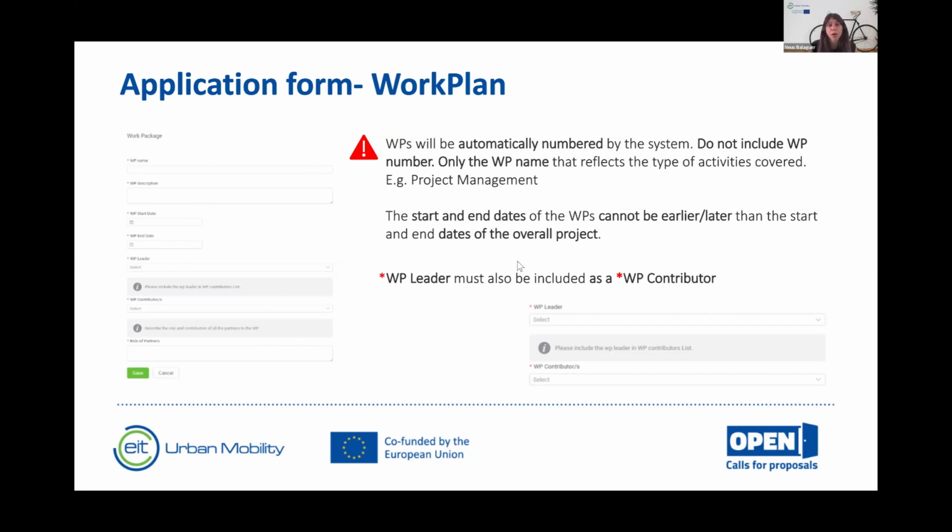And you also have to add the starting date and the ending date of the work package. This starting and ending date cannot be before the starting date of the project or after the ending date of the project, but it could be shorter, for sure, for the time that you need to implement this work package. But never before the starting and the ending date of the project.